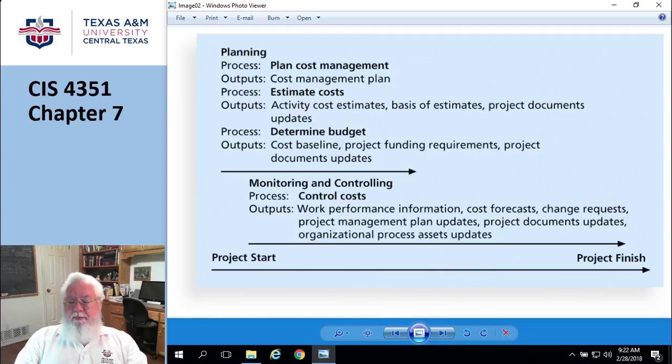Okay, we're almost to the end of these goofy terms. The next one is reserves. Reserves is basically your buffer in the budget, a portion of the estimate for contingencies. In the construction world, a classic example of this is weather delays. I know how much it's supposed to cost, but I'm going to put 20 weather days in there because that's just my contingency funds in case something goes wrong.